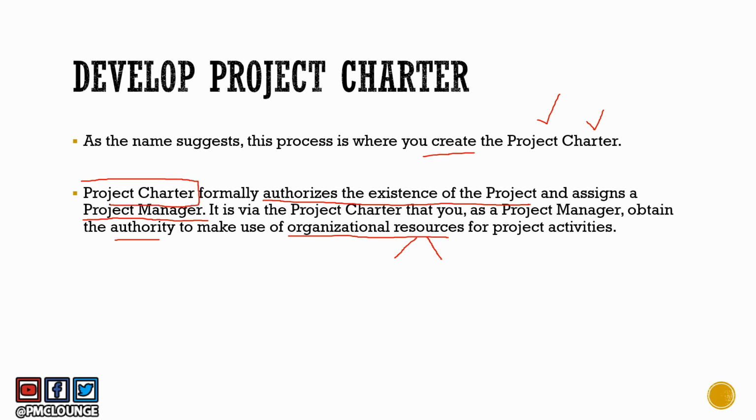Most likely, if the project charter is baselined, the test manager, the functional manager, all other functional managers, the development managers, they're already aware of this project. They're already aware that you are the project manager. And that is the importance of the project charter. So once it is formally baselined, all key stakeholders already know that there is this project and this guy is going to be the project manager for it. So when you go and ask for resources, be it team resources, be it physical resources, they already know the existence of the project. They already know that you are the project manager and they are going to assign those resources to you. So that is the importance of a project charter.